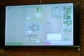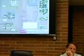We did a breakout on this, and the current house and buildings that were on the property when we purchased it are 0.4 acres. The HLP portion of the substation has 1.32 acres of the green boxes, and the RMP portion of the sub is 1.17 acres. Total land used in its structures is 2.89 acres, which is total land use of 14.5%. We just had an engineering firm do this work for us. Any questions on any of that?